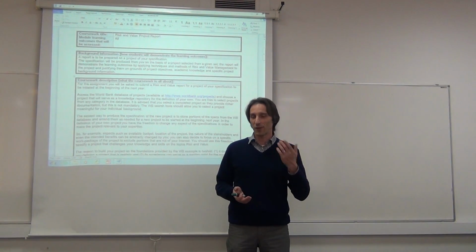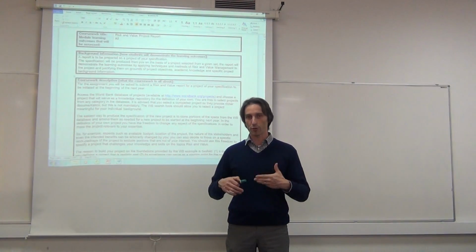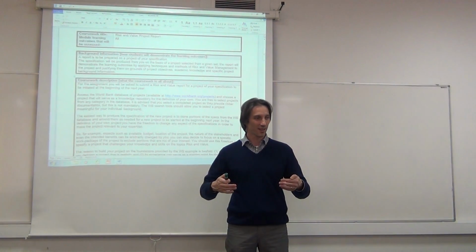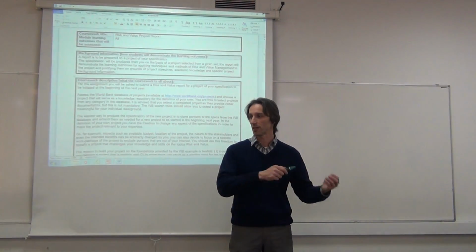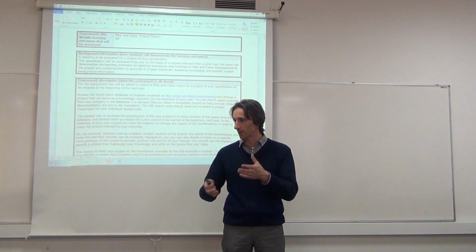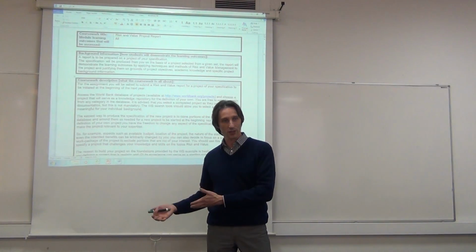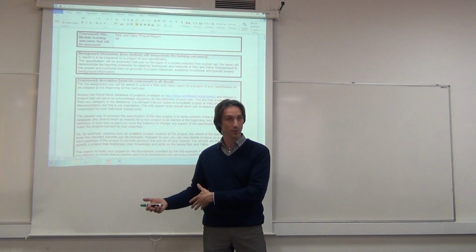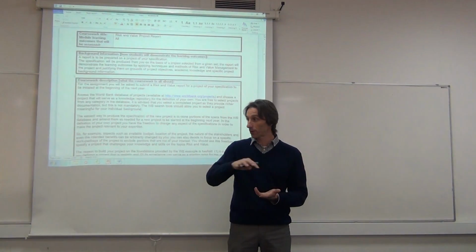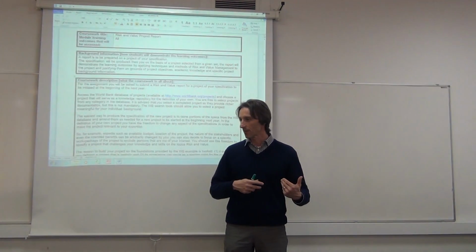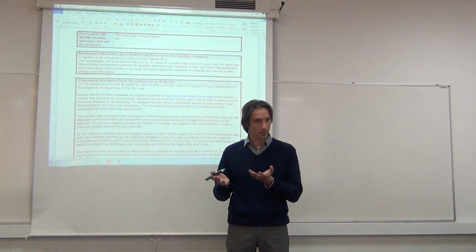The flip side of authority would be efficiency, because in general very authoritative processes are slow to react. So somebody takes their time to make a decision, and then time passes between that moment and when the information is actually transferred to the people that need to act on those decisions. So you have to make a process that is not only authoritative, but also efficient. So it's a difficult balance to strike very frequently.